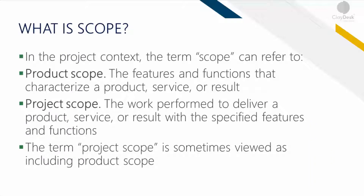In the real world, you typically just create the scope, you have the WBS, and then you move forward as a project manager, scheduling those tasks in Microsoft Project Schedule or any other software. In the project context, the term scope can refer to the product or the project. Product scope refers to the features and functions that characterize a product, service, or result. Whereas project scope refers to the work performed to deliver a product, service, or result with the specified features and functions. Project scope is sometimes viewed as including the product scope as well — just a subtle difference between the two.